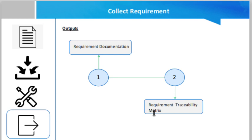The second output is the requirement traceability matrix, which is a grid that links product requirements from their origin to the deliverables that satisfy them. It helps ensure that each requirement adds business value by linking it to the business and project objectives. It provides a means to track requirements throughout the project lifecycle, ensuring that requirements approved in the requirements documentation are delivered at the end of the project, and provides a structure for managing changes to the product scope.